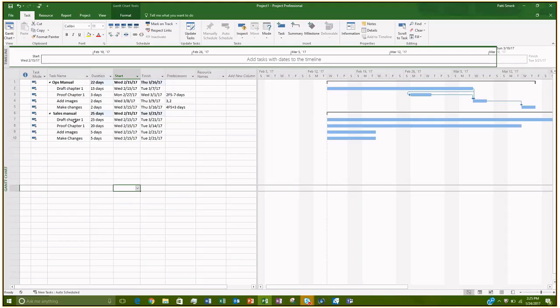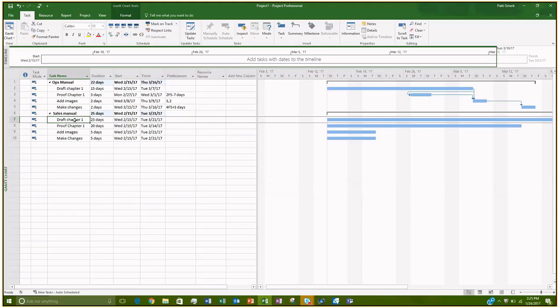And then here, if I wanted to be really quick with my new trick that I learned about linking all of the tasks together, I can just select all of the tasks at once by clicking and dragging, and then using my link button at the top.